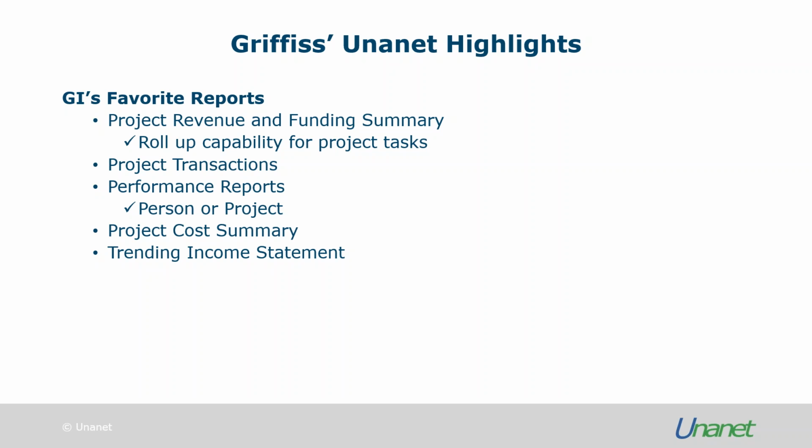The project transactions report allows you to see all transactions that have occurred on your project. This one is very helpful. Just if you're having trouble identifying what some of your expenses are that have gone in through the financial end of the software, you can pull up your project transaction report. Performance reports are great for people. You can see how many hours someone has worked, what their average hours are, how many hours someone's been assigned. You can run it at the person level, or you can run it based on your projects. And this can help you make sure that you are not over allocating resources on a project that you don't have the funding for.